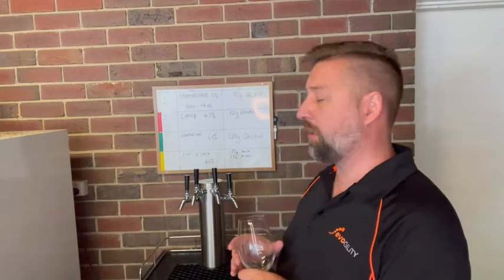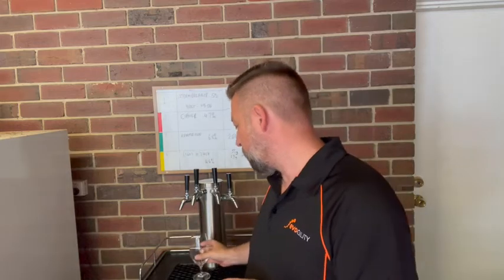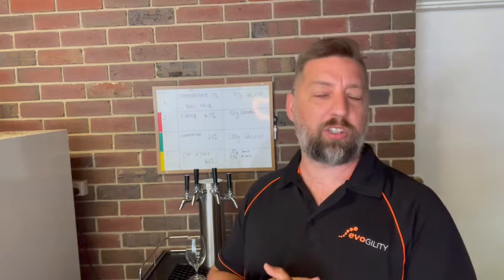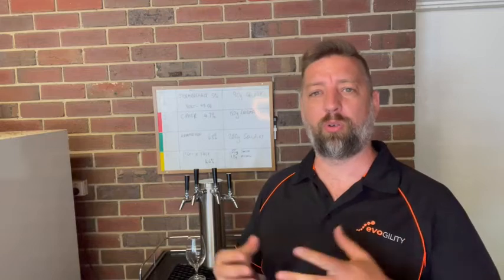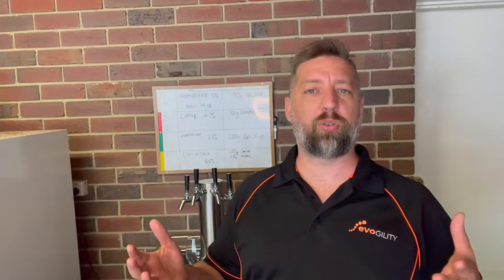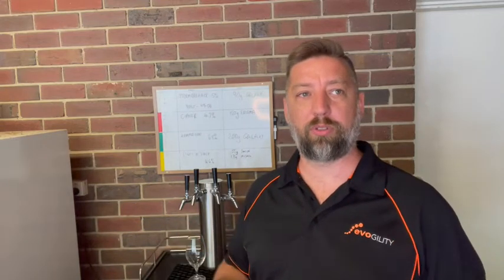The other one that we'll go into a little bit more detail is the flow review. So we'll look at how things are moving through the system. Do we have the right things moving through at the right times, the right people involved? Are we managing blockers and dependencies, any sorts of things like that? With aging, all of those sorts of things can come up in our flow review, or as we know it in a more mature environment, the service delivery review.